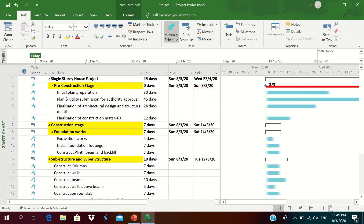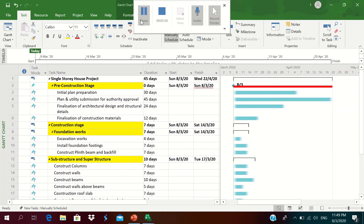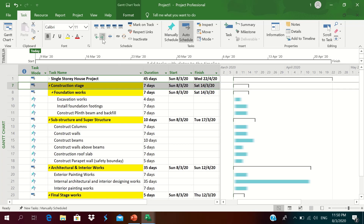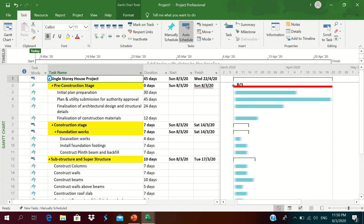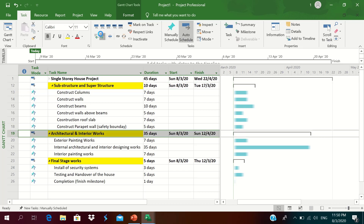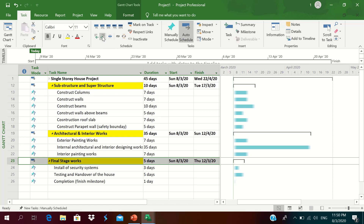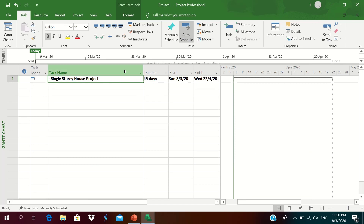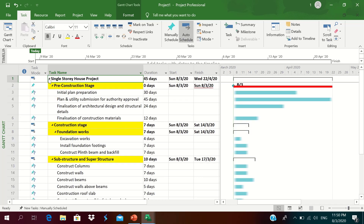Now we check whether all WBS elements are under the housing project. We indent them into the single housing project — the pre-construction stage, foundation works, and final stage works all get indented. Clicking the single-story housing project shows all activities and the total duration with start and finish dates. This is before linking; after linking the total duration will increase depending on the relationships.